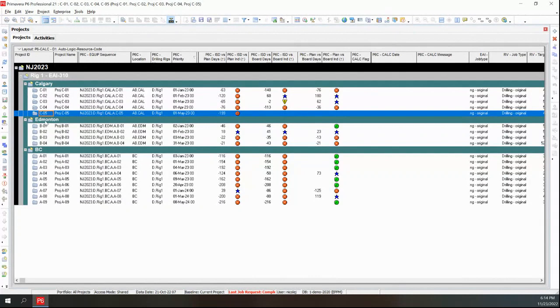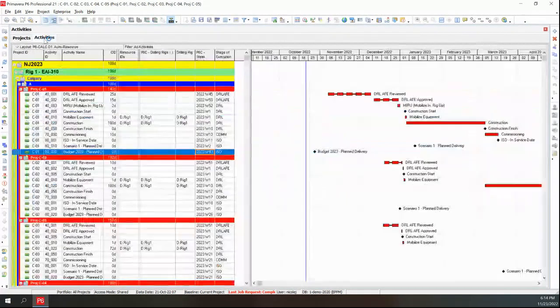Now, the drilling rig is a key controlling factor in this example. So a rig can't be at two places at once. So we're showing the rig, we're showing the geographical location, and then we're showing the different wells that that rig is planning to drill, okay? So we currently have an order of 1, 2, 3, 4, 5.